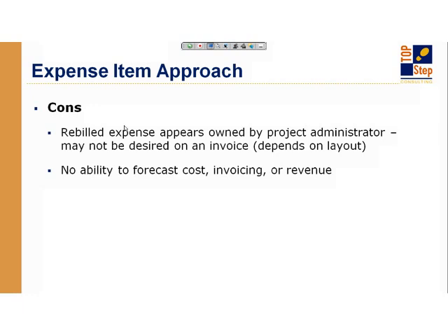And there's really no cost accrual, because the only time the cost gets in the system is when the actual cost comes in on a piece of paper or an email from a vendor saying this is how much I'm invoicing you. So from a financial perspective, you're not sure what's outstanding for payment. Okay.